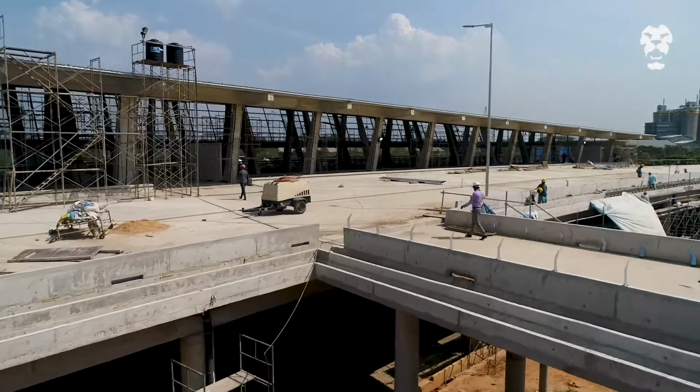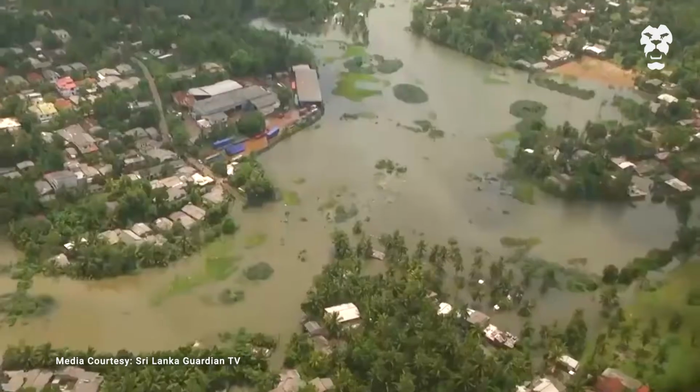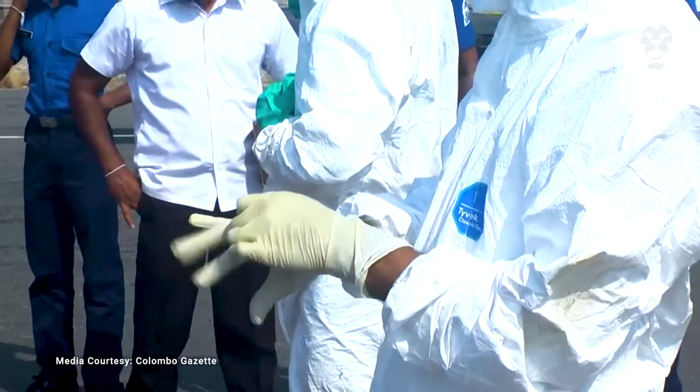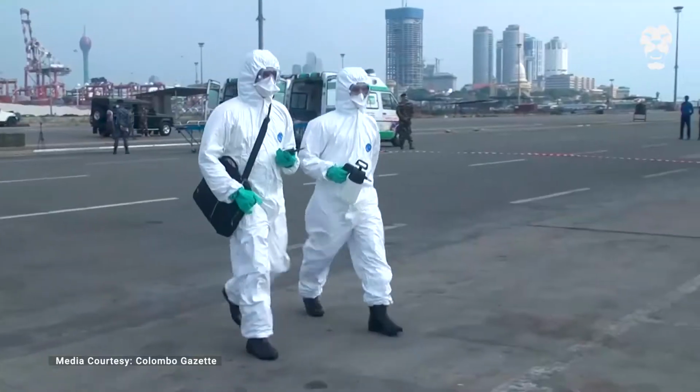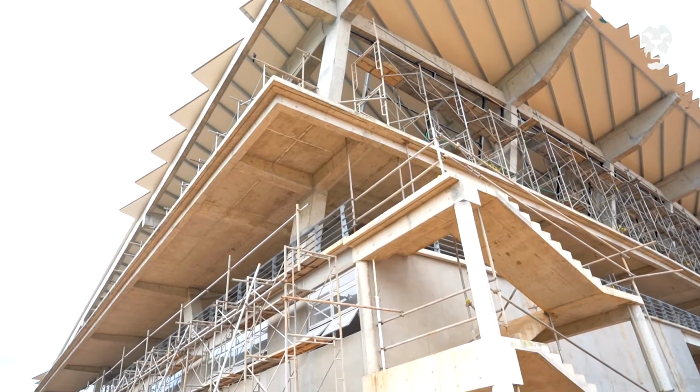The project has faced many challenges along the way. Heavy rains in 2018 affected construction on the marshy land of the site, and the onset of the COVID-19 pandemic in March 2020 further affected construction plans. The workforce dwindled to 1/3 of the initial numbers. Satisfying the architectural intent while fulfilling the other requirements such as providing services and other facilities to the building was also a challenge.